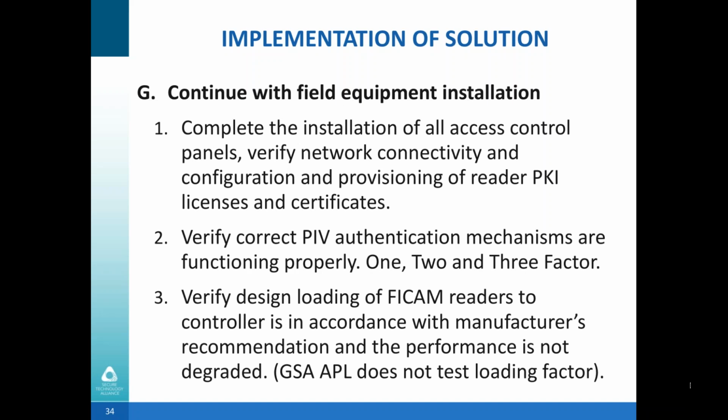Continue to march on with the installation of all access control panels, verifying network connectivity and configurations. Be sure to check if the reader licenses and certificates have been loaded. These are, by the way, hardware certs required by readers to allow them to perform the PKI challenge response process.